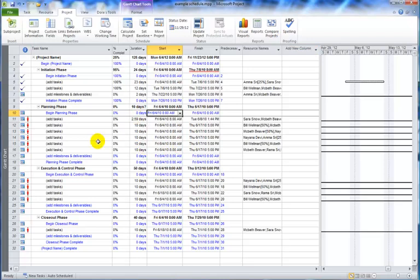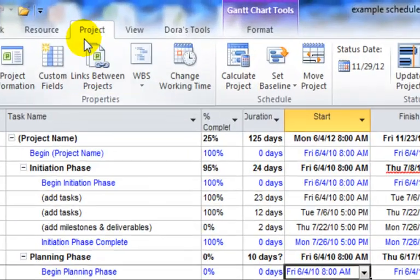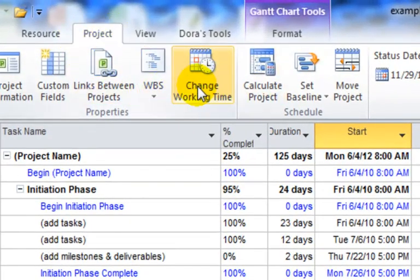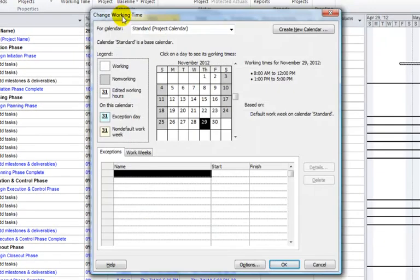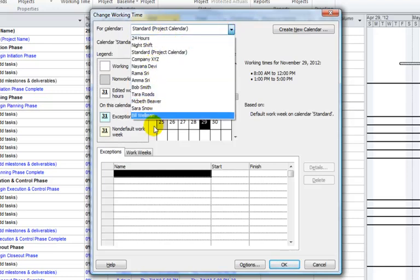Now let's look at the calendar. The days and times that your resources work affect the duration of your project schedule. If you have teams in different parts of the world, a standard work week may be different. Or if you're working with vendors who have a different holiday or calendar schedule, their work hours would differ. In Project, we define calendars to specify the days and times that people work. Under the Project tab in the toolbar, there's a Change Working Time button. If you select that, the Change Working Time dialog box opens, and by default it opens the standard calendar. If you have multiple calendars, you'll see all of them here, as well as calendars for all of the resources.